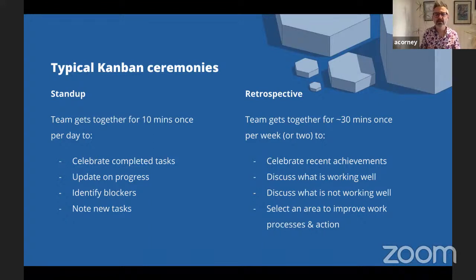There's a way to identify blockers. So if someone's stuck on something or feels like they're going to get stuck on a task, that's an opportunity for them to get other people to potentially help them with that. And then also if new tasks that have been added to the board need to be discussed or declared, then at least they can be noted. But ideally, you don't spend a stand-up talking about new tasks. You schedule a meeting to talk about tasks if they need to be presented in detail. So it's a very quick meeting just to keep everyone in sync.